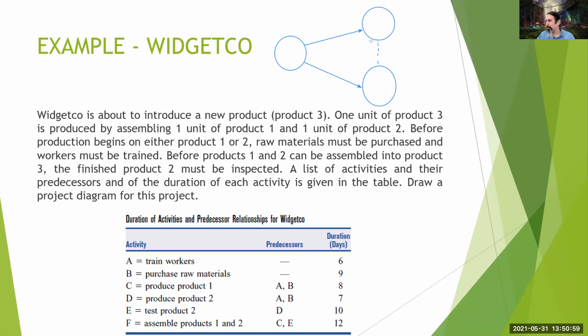And then I will say that this is like this, for example. This one will be activity A, and the bottom one will be activity B. This is the first node, let's call this one the second one, the dummy one, and this is the third one. So this is the starting node. A is leaving the starting node because it has no predecessors. B is leaving the starting node because it has no predecessors. And they are ending at nodes 2 and 3.